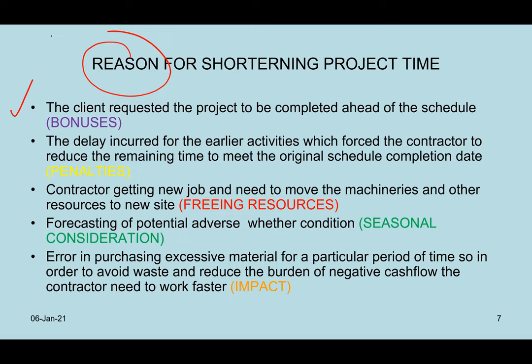So there is a possibility. Or even, it is for the benefit of the client. Let's say the project is a hotel building. When the hotel is completed, the client can open the hotel and start generating money. But if the project is prolonged, delayed and delayed and delayed, the client is not going to be happy because there is no income coming in yet. That could be the motivation for the client. So the client requests the contractor, can you reduce the project by how many months? And then the client will ask, what could be the potential cost, either increase or decrease? The client wants to know that.